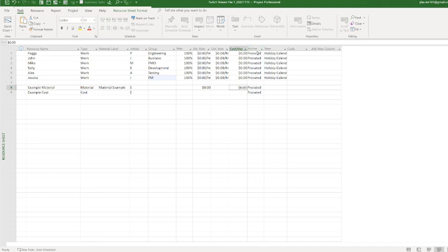Then the accrual rate, you have multiple types. So you've got prorated, you've got start and end. So prorated is, over time. Start means you get paid up front, end means you get paid at the end. That's basically what that means. Clear, easy, breezy, simple, to the point.